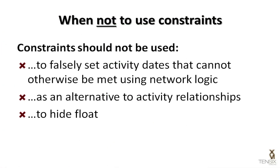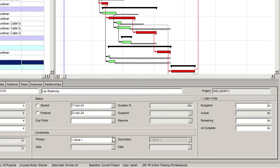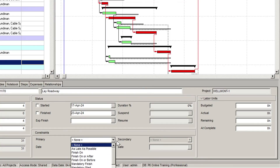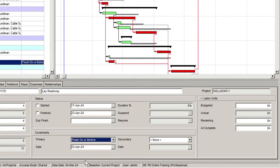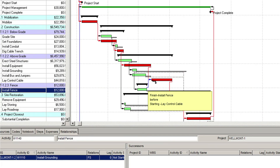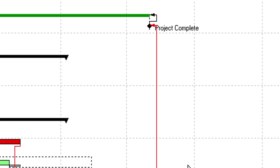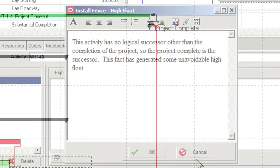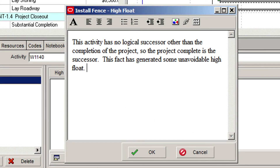Constraints should not be used to hide float. Using finish constraints to hide float is a bad scheduling practice. If activities are exhibiting high float, find viable and realistic successors for the activity. If there is truly no logical successor, link the activity to the project complete activity or milestone and enter a narrative in the P6 notebook area to explain the high float.